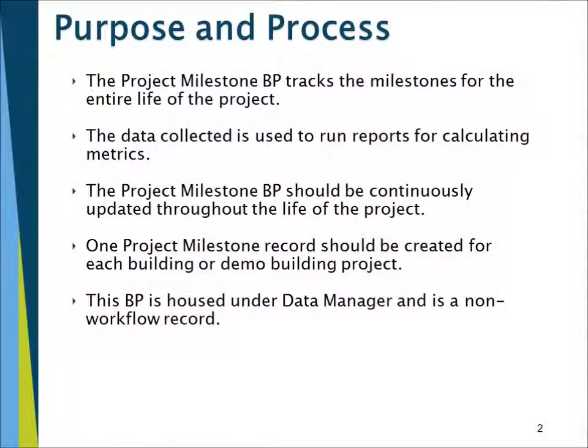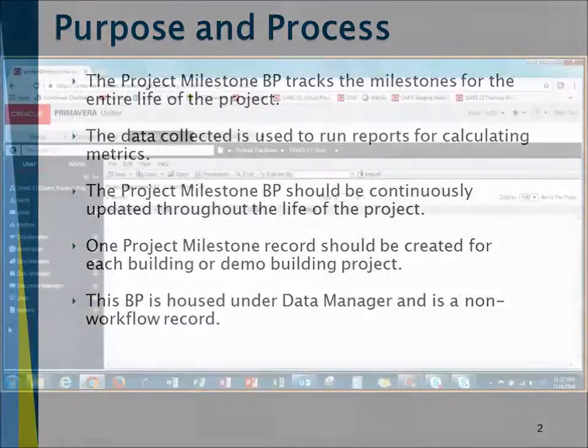The Project Milestone BP tracks the milestones for the entire life of the project. The data that's collected is used to run reports for calculating our metrics. The Project Milestone BP should be continuously updated throughout the life of the project. One project milestone record should be created for each building or demo building project. Finally, this BP is housed under Data Manager and is a non-workflow record.